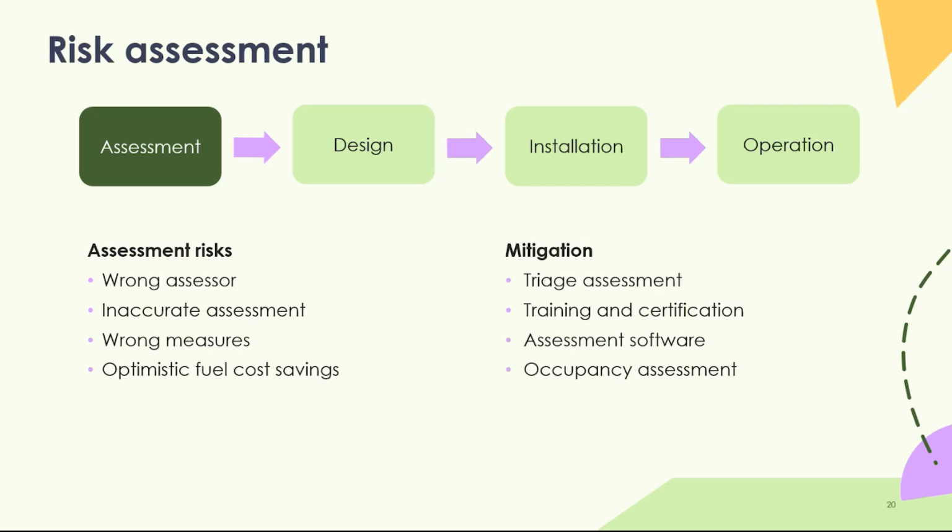But that's definitely one to keep an eye on from the earliest stage, because it's a bit like garbage in, garbage out. If you get poor data in at the start, all of the decisions you then make will be inherently flawed, and normally that only becomes apparent halfway through, and in some cases very late on, when there is very little time left in a grant funded program to do anything about it.